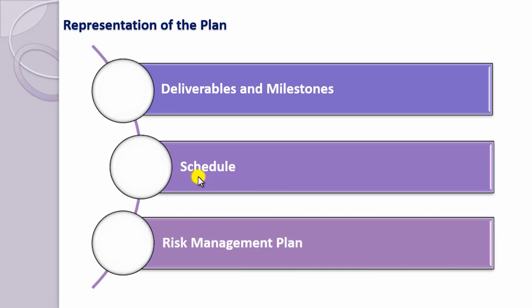Then comes the risk management plan. The risk management plan is the risks you have anticipated, that we have seen, and the steps you will take to mitigate them if they materialize. And with this, there is one extra item which is about the assumptions and constraints: the circumstances or factors you have assumed to be true and that you have identified as limitations, combined to explicitly state the framework or context you are operating within.